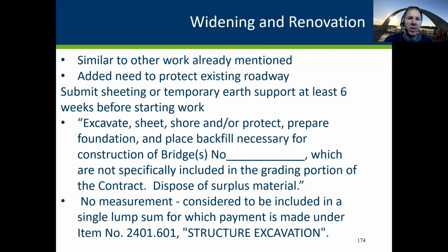So widening and renovation, that is more substantial work. So we might have a redeck and we want to widen the bridge. Some of the nuances of that, besides the traditional remove deck cautions, are that you may undermine the roadway off bridge. So all of a sudden you're into protecting off bridge assets. So the provision in your package would be some phrasing like excavate, sheet, shore, and/or prepare the foundation and place backfill necessary for construction of the bridge.